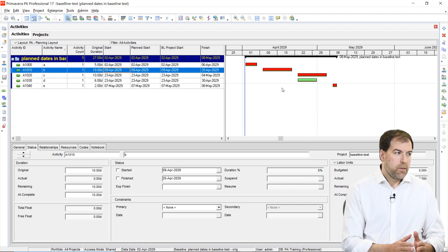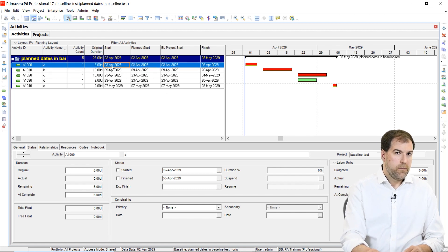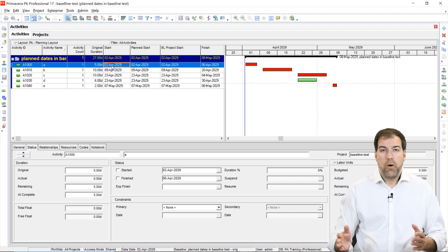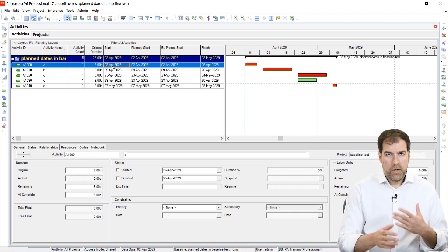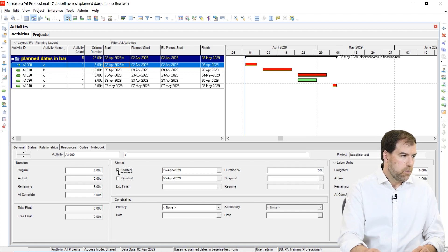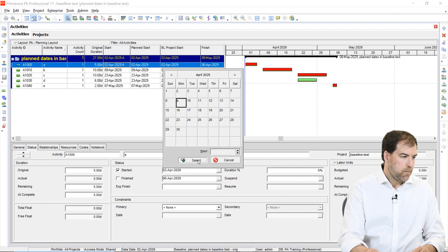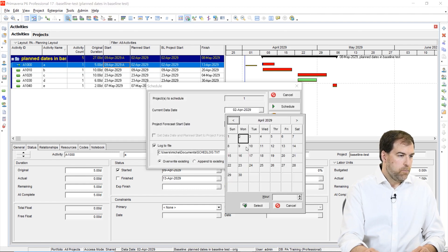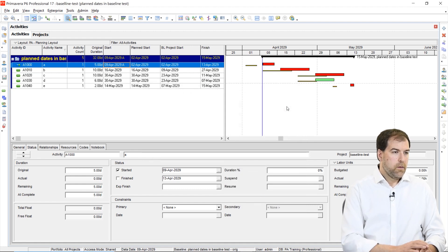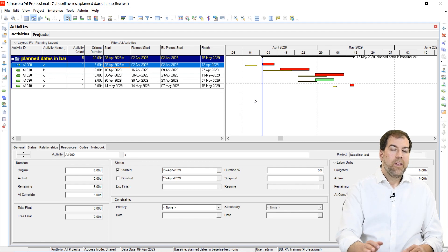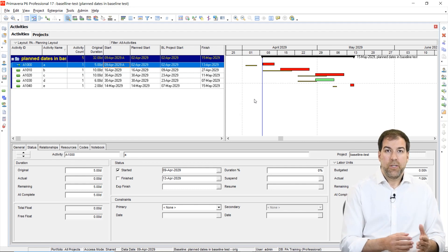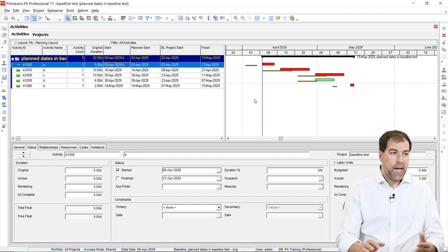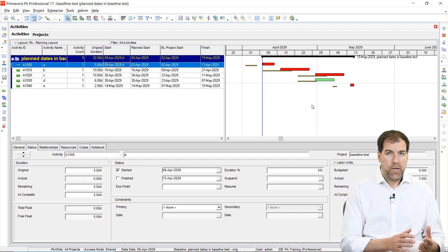So let's say that this project was slated to start on April 2nd, but in fact, it started a whole week later. So let's do a progress to set that up. So let's start this, market started, but let's move it out a week to the ninth. And let's go ahead and reschedule moving our data date ahead of week as well. And have a look at the results. So let's say in this project scenario, we actually did start a project a week later. Well, right off the bat, I'm out of disadvantage because my baseline bars don't match any for any more.